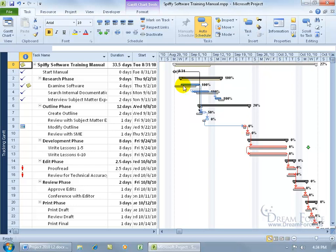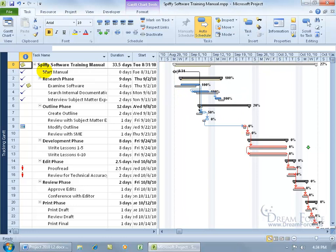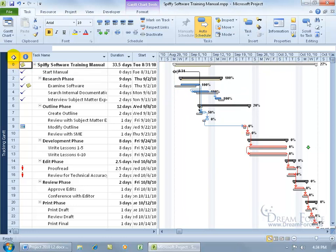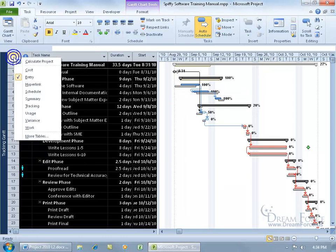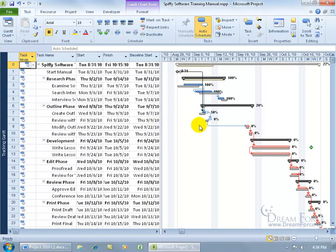You know, if you get tired of hovering to bring up the pop-ups, you can go ahead and change the table here, as we just learned. Right-click on the table header from Entry, and you can go to Variance, so you can quickly look over here and see is anything off.